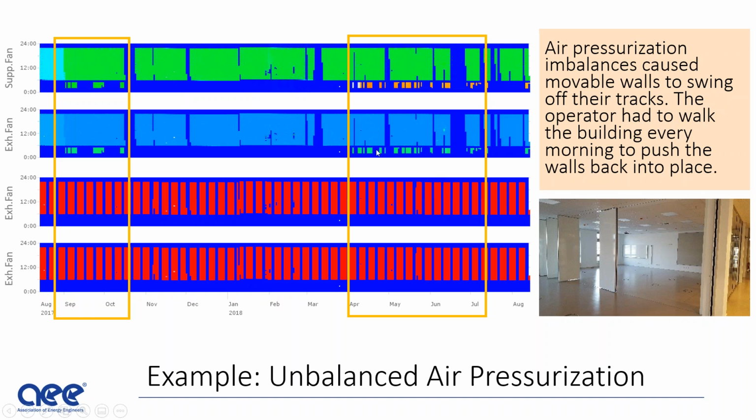And what we noticed here was at night, when the night cooling operation was taking place, the air handling unit was ramping up operation, but the exhaust fans were not going into operation. So when you have air getting shoved into the building, but not enough air coming out of the building, it's like blowing the building up like a balloon. And that's something that we noticed, a little idiosyncrasy in the programming that caused an issue.